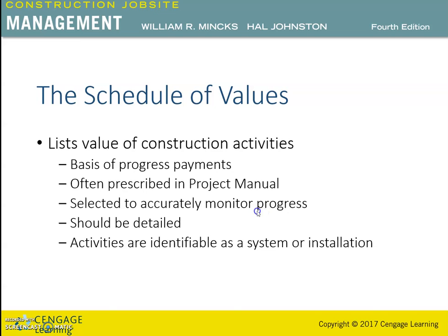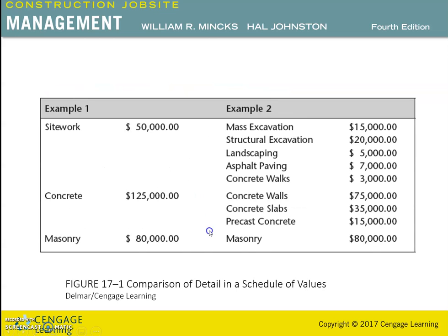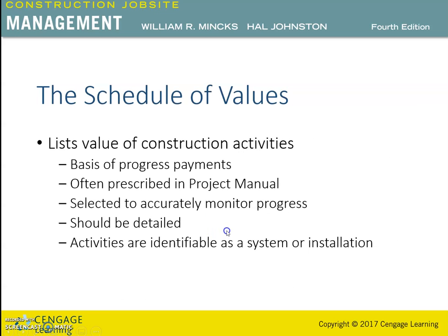So this method creates a large number of payment activities. It is described that the use of the construction schedule activities as the schedule of values for payment request emphasizes the payment schedule rather than using it as a planning tool during construction. So a separate schedule of values separates the management of payment request processing and construction scheduling. The schedule of values normally will list construction activities that are identifiable as a system or installation.